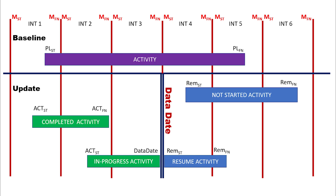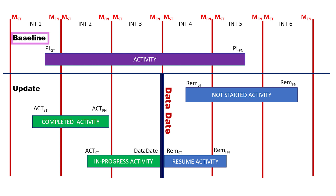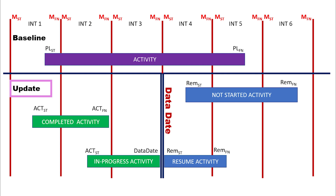In Planovera, the activity has two attributes. First, under baseline or planned value. Second, under update. Activity during baseline has only planned start and planned finish dates. But for activities under update, you should first have a data date for the schedule.